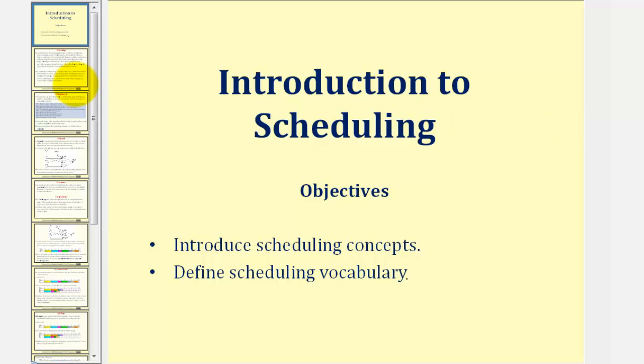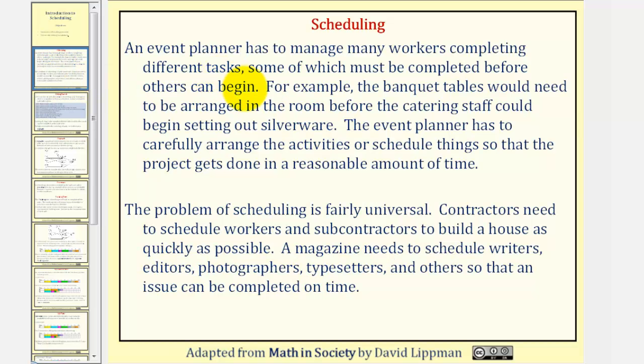Welcome to Introduction to Scheduling. An event planner has to manage many workers completing different tasks, some of which must be completed before others can begin. For example, the banquet tables would need to be arranged in the room before the catering staff could begin setting out silverware. The event planner has to carefully arrange the activities or schedule things so that the project gets done in a reasonable amount of time.